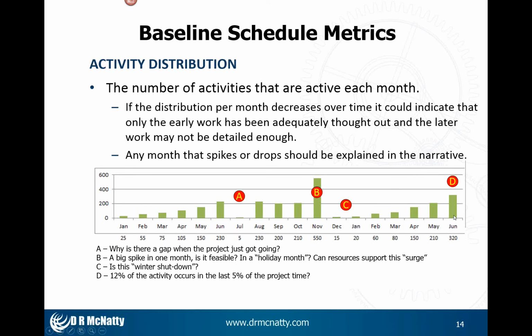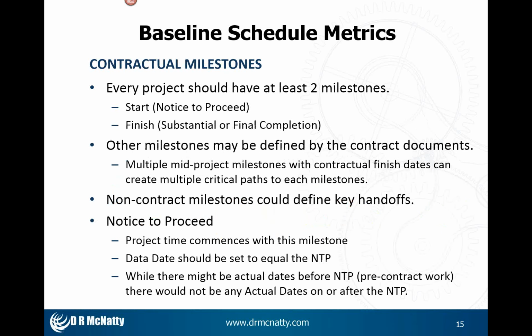And here's one that we see all too often: in the last month or two of the project, suddenly you got all this work going on. Well, that could be the result of someone trying to fit the schedule within a time period, and it just might not be realistic, and you need to address that during the original baseline review.